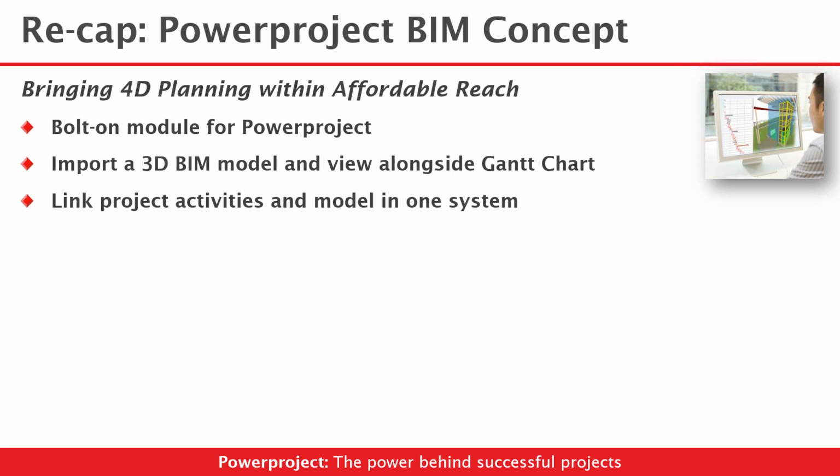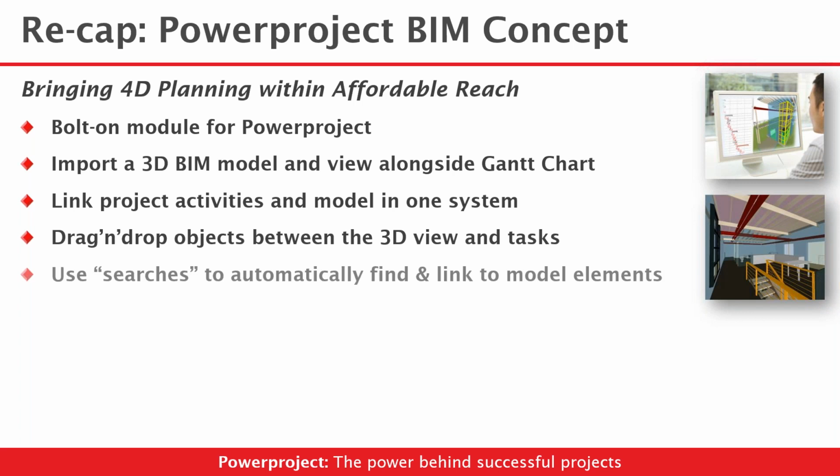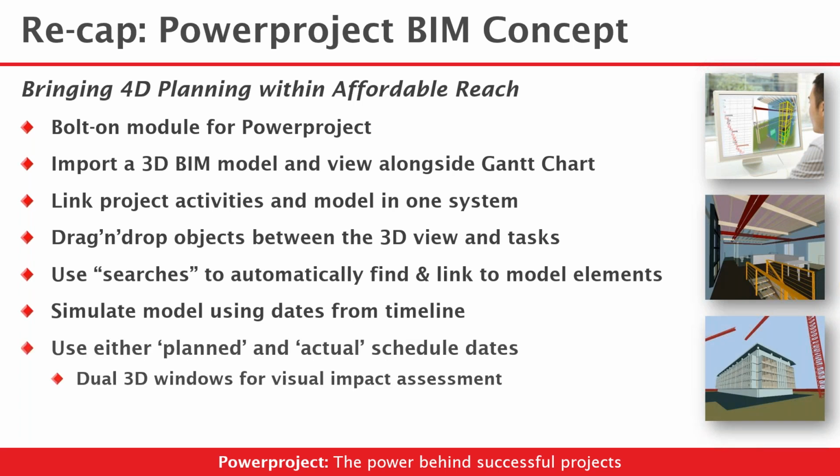There's a process to go through that we demonstrated yesterday of linking the project activities up to the schedule, getting the model and those tasks all coordinated together. So that's what we did yesterday. We looked at how we can drag and drop items towards each other or use searches to link lots of items to one or more tasks. And the end game being the ability to simulate a model and to do that against either your planned or actual timelines. So we can do a visual impact assessment. And we started yesterday to touch on how we might share that data with other people. And really, this is where we're going to start from today and move forward.